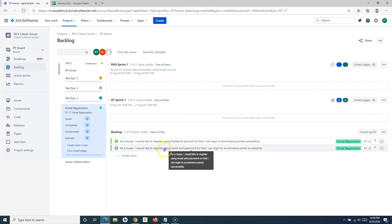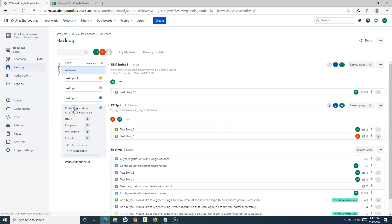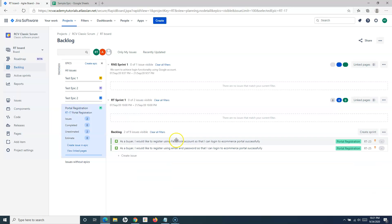If I click on the Portal Registration epic, you will see it has two user stories. Usually you will close the epic once all the issues are done or completed within that particular epic. In Jira you can have automatic closure of the epic once all the issues within it are completed, but by default the epic closure needs to be done manually.